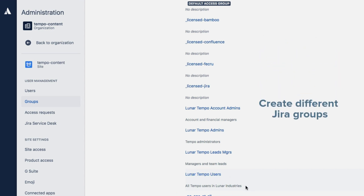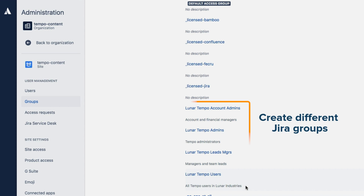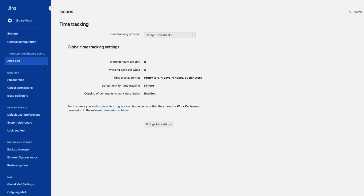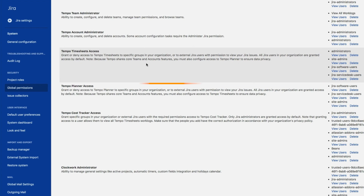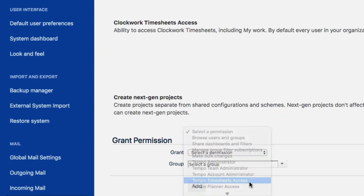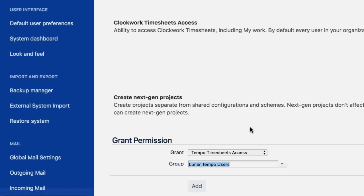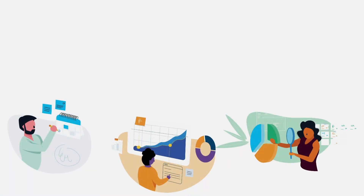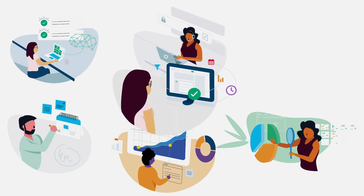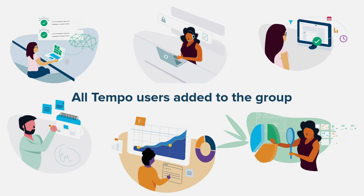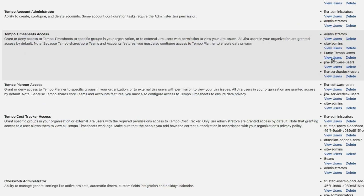Generally, it's good practice to set up Jira groups for different levels of permissions for using Tempo Timesheets, as I've done with these other groups. With that done, I'll go to the Global Permissions and find the Tempo Timesheets access permission, and add my Lunar Tempo Users group to grant them access. After the key people have given the green light to Tempo Timesheets, I'll add the rest of the employees at Lunar Industries to this group, so there's no need to add permissions for individual users as they join the company. This makes it a lot easier to manage. Then I can remove access to Tempo Timesheets for any of these other groups.